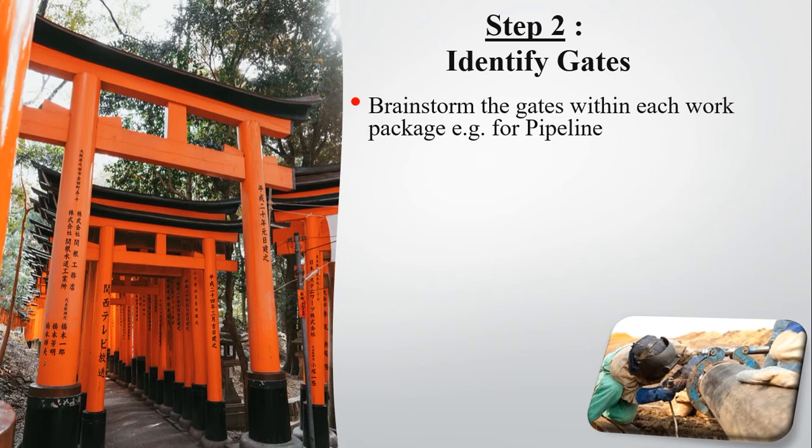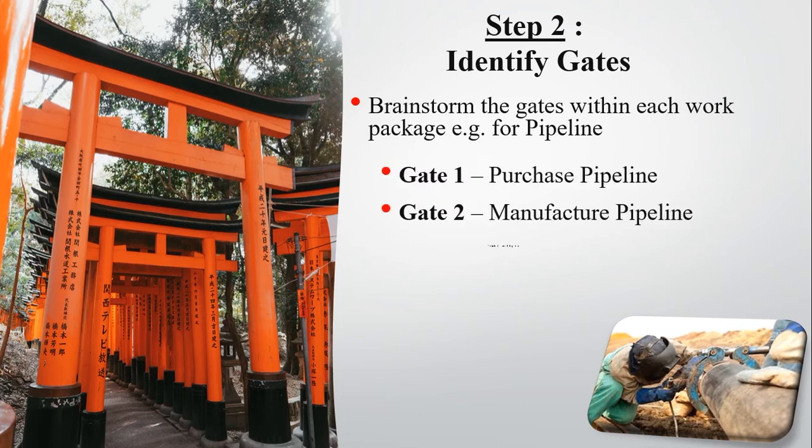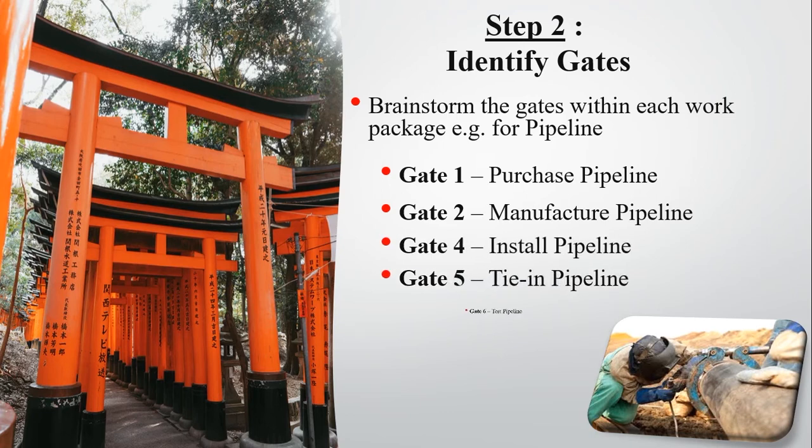If you think about building a pipeline tomorrow, you've got to think about procuring the pipeline. You've got to think about manufacturing the pipeline. You've got to think about installing the pipeline. You've got to think about tying in the pipeline. You've got to think about testing the pipeline. And you may think about the as-built documentation at the end. So indicative, apply this to your own project.